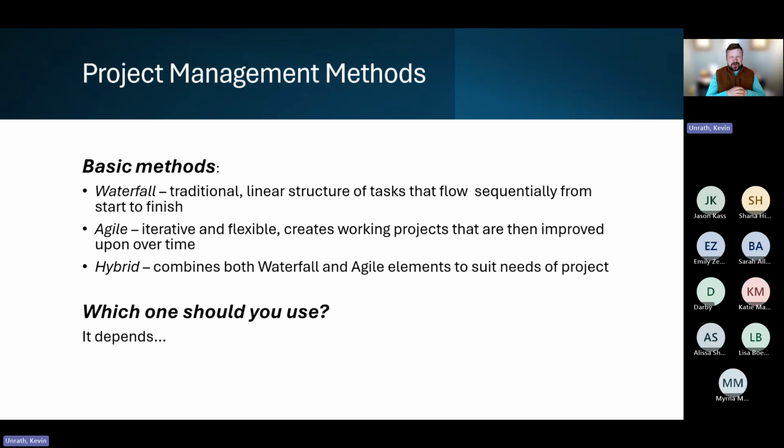I don't think any of us plan a program that quickly and just do it. Maybe we do. But the key element to this kind of agile project is getting that feedback for that first iteration of the project that you offered, and then taking that and revising the work that you did. So maybe the feedback you received was that Friday morning wasn't a great time to offer it because kids were in school and parents were working. So maybe Saturday morning was a better time to offer it.